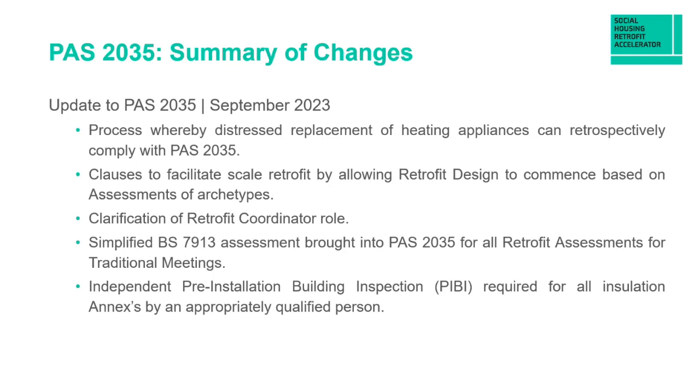completed. So it basically says that if your property's earmarked as part of a retrofit project, you can replace that boiler fairly quickly under the new guidance, and then retrospectively come back with your retrofit coordinator, do a full assessment of the property, produce your improvement options evaluation and your medium-term improvement plan, and therefore still be compliant with the PAS 2035 process. There's been some clauses included to facilitate the scale-up of retrofit.